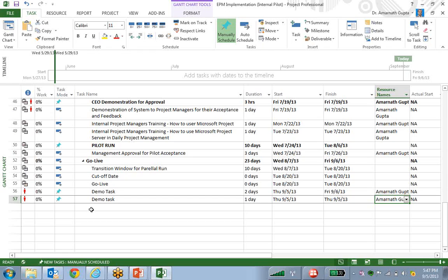If I say that no, my project is most important, I am going to be in trouble, I have to use Ashish Malik tomorrow. At the same time, if Jenny is also saying that no, her project is also most important, she cannot shift the task, so she also needs to use Ashish Malik tomorrow, then that means we are now in a fight. We are now in a clash. We cannot mitigate this issue. In that condition, the resource call should be taken so that senior management can take a firm decision that all right, we are supposed to postpone this task or this particular project task for this day and let us utilize the person on that particular day.